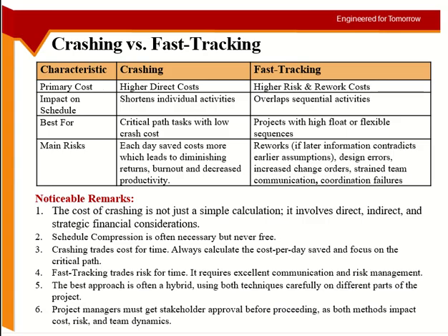Okay, so where the critical path has activities which can overlap with each other, they are flexible in terms of their dependency. Remember, we said dependency. So where the dependencies are flexible, you can go for fast tracking. It doesn't matter if you do it one after the other or if you do it together. Okay, then you will go for fast tracking.